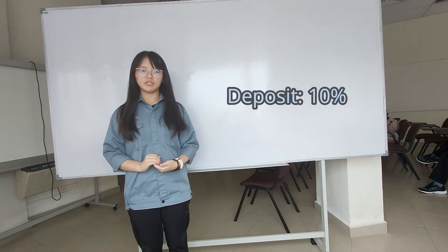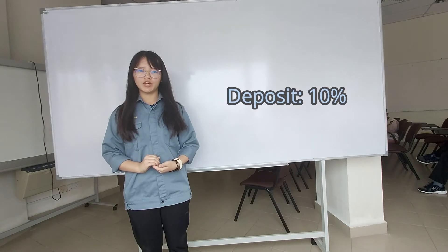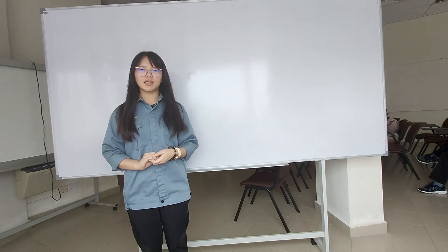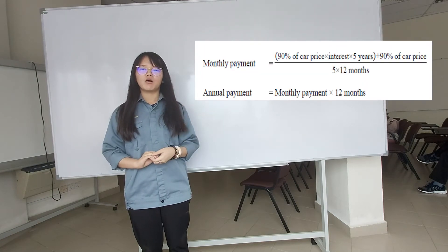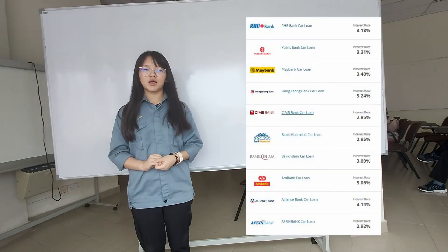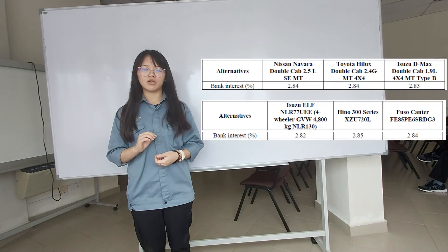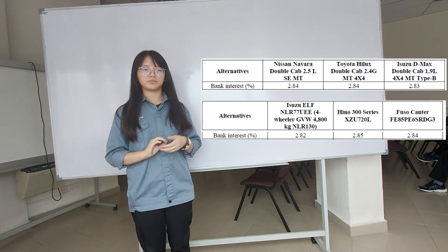By using a 10% deposit, the deposit for each vehicle is as shown here. Next is to calculate the monthly payment and annual payment, using the formula shown. For the interest rate, it differs according to the type of bank. Taking into account advice from an expert at a local bank, the interest rate used is as shown here.